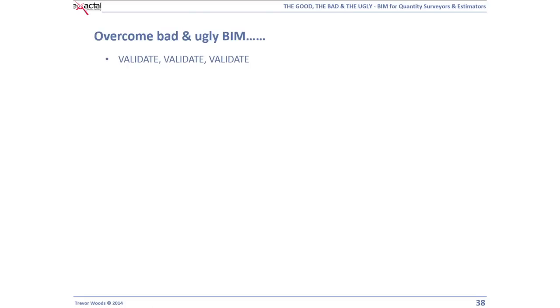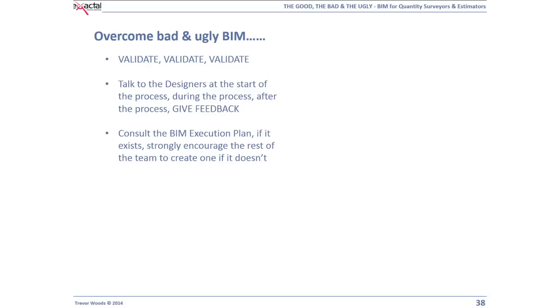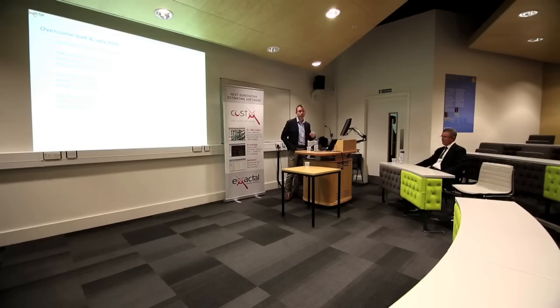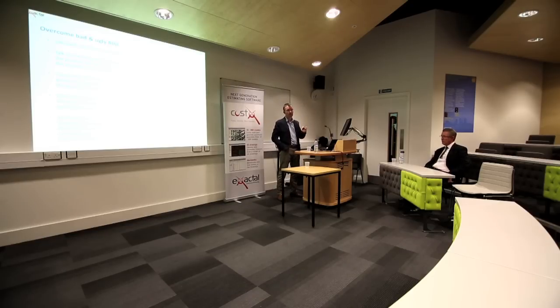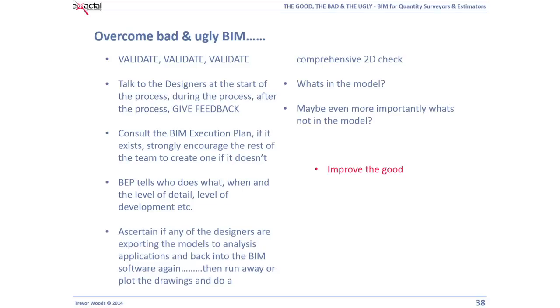How do you overcome bad and ugly BIM? Validate, validate, validate. Talk to designers at the start, during and after the process. Give them feedback — tell them what does and doesn't work. There should be a BIM execution plan on the project setting out who does what, what software they're using, software versions — look for it and check if designers are exporting models for analysis. Figure out what's in the model, but more importantly, what's NOT in the model. Is there a gap in scope? Not everything will be modelled. You need to improve the good, fix the bad and eliminate the ugly.